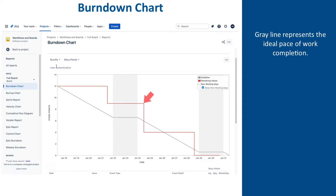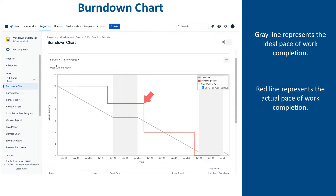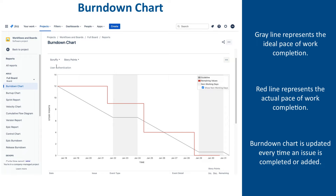The second is the red line, which represents the actual completion of the work. At the beginning of the sprint, which is the beginning of the horizontal axis, the red line shows the total effort of the work planned for the sprint, which is the sum of story points from all issues planned for the sprint. In the case of the Scruffy sprint, that effort is 12 points. Then, every time an issue is completed, the number of story points associated with that issue is deducted from the sprint total, and the red line drops by that amount.